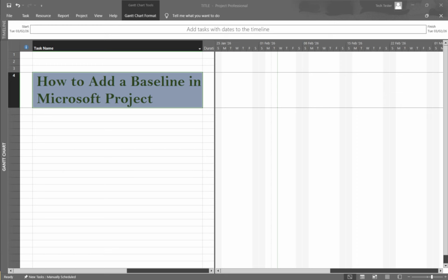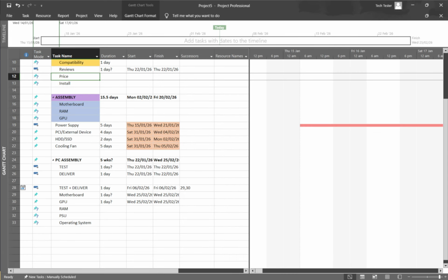In today's video, I'm going to teach you how to add a baseline in Microsoft Project. A baseline is your project's original snapshot, the plan you commit to before tracking starts. It locks in planned start and finish dates, durations, work, and costs, so you can compare what you intended with what actually happens later. Microsoft Project lets you keep up to 11 snapshots called Baseline and Baseline 1 through Baseline 10, which is handy for major checkpoints without losing your first plan.